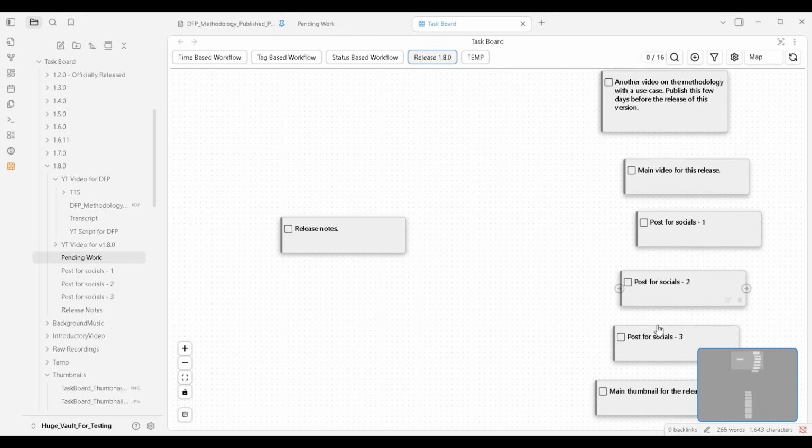Now, the next step is to find the tasks which have been blocked by these independent tasks, that is, those tasks which I cannot start working on until I complete these independent tasks. So let me find them and arrange them to the right of these independent tasks, in a column fashion which will indicate the next stage of the project.